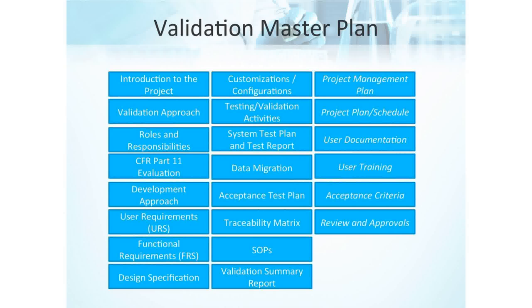It could be a section of your validation plan for reviews and approvals, might be handled by SOPs. Typically, to approve a system, you've got the system owner, the business analyst, and the IT quality assurance. Keep in mind that whoever signs a document as an approver is going to be required by the FDA auditors to defend the system. They're totally on the hook. So if people are saying you need to make sure that the head of quality signs off on a particular system, it's because they are the ones who will be representing the company if the FDA were to walk in.